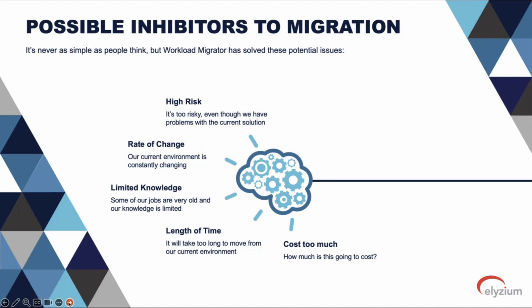Is it still needed? We use a traffic light system, red, amber, green. Red means it's no longer needed, doesn't need to be migrated. Amber means it's migrated but not tested. Green means it's needed, so therefore migrated, tested, all those sorts of things. It goes through the full process. Again, it's the cleanest way of doing it. It's the quickest way of doing it.